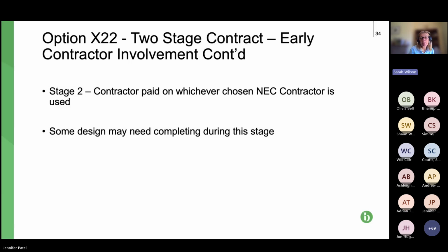And stage two is your engineering and construction contract, when the scope has been agreed and the price has been agreed. But note that before you enter into stage two, both parties have the option. It's basically up to each party. If the scope and the price, and I guess the timescales, can all be agreed, they proceed to stage two, the engineering and construction contract.